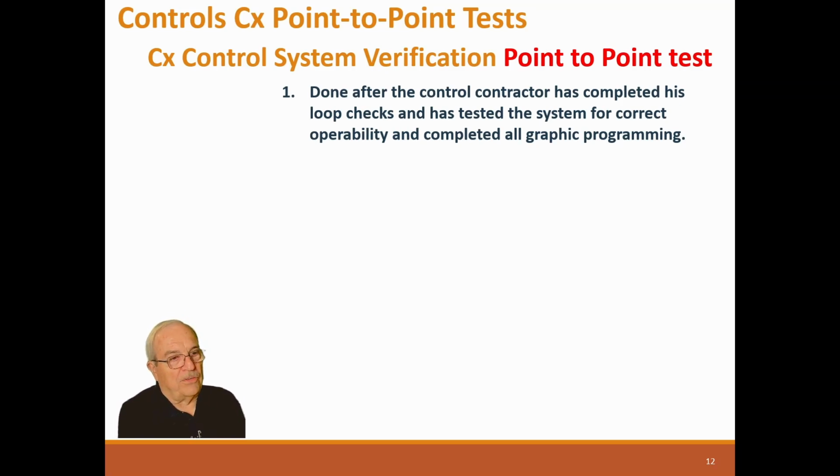So unfortunately, from the time DDC was invented until just the last couple of years ago, and sometimes still, the habit of the control contractor was to build a job, and then once the job was done, he would start on the graphics. And he would tell the owner, well, it's going to take me a while to do the graphics, so you'll have them by the time you're fully moved in, or get used to it. And sometimes 3 or 4 months after the building was occupied, they didn't have control graphics.